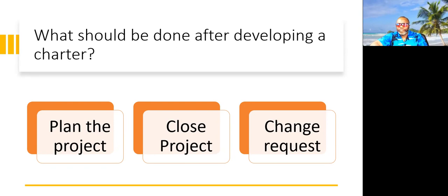All right, 3, 2, and 1. So what should be done after developing the charter? The answer, my friends, is not to close out the project. And it would not be a change request because all you've done is develop the charter. The best answer is you would plan the project. So you develop the charter, then you go into planning. That would be the best answer. Okay, here's your next one.